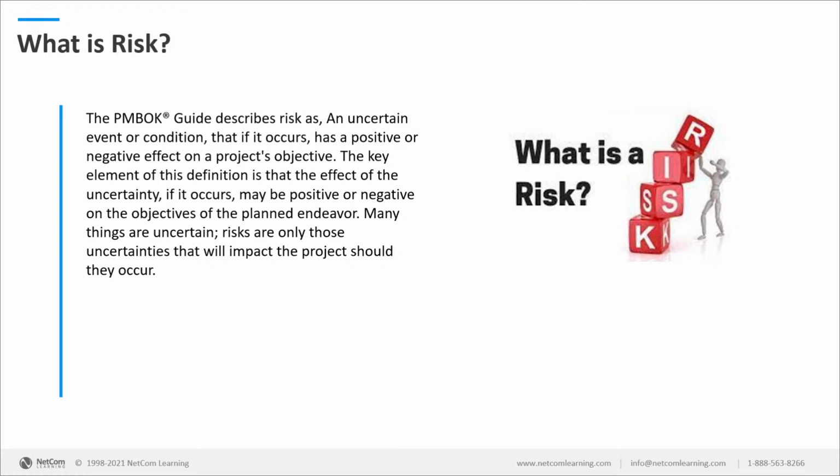And keep this in mind, it is always considered in between 0 and 1. It will never be an absolute 0. It will never be an absolute 1. And the reason behind that, team, is if you say that there is a risk which is considered as 1, which essentially means you're 100% sure it's going to happen, then it will not fall under the category of risk. It's going to fall under the category of issue. And if you're saying it's 0, which means you're 100% sure it's not going to happen at all, then it is not supposed to be part of your risk document.